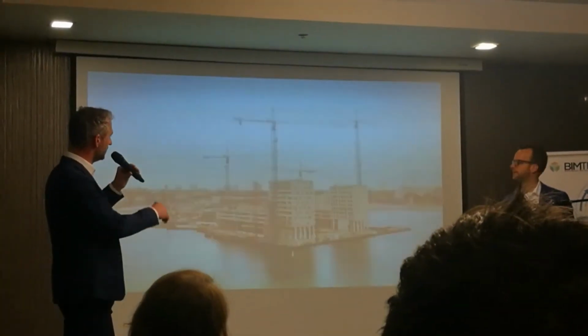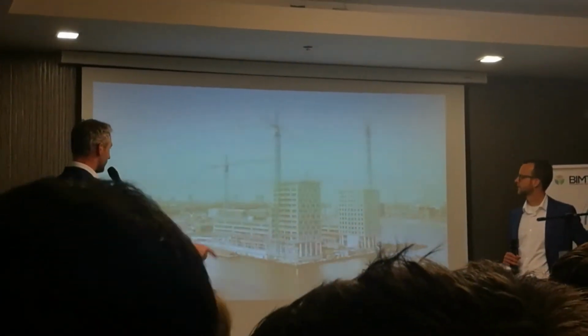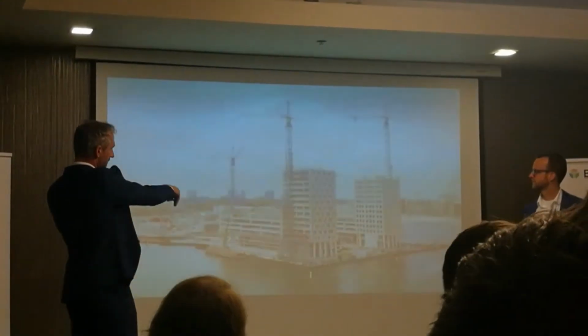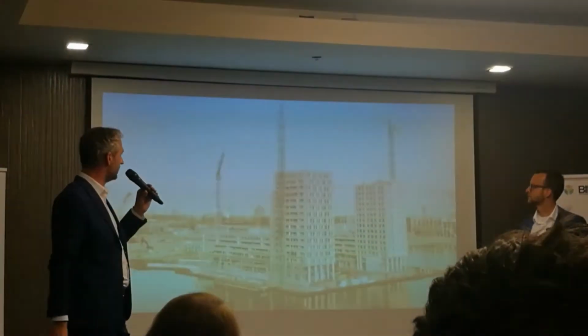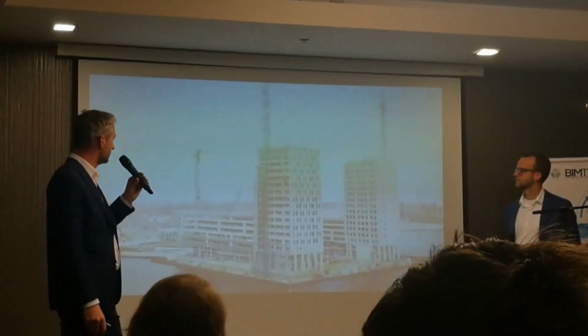And what you see is all prefabricated elements that were placed in position. So around the building there was a road for trucks, and next to the tower cranes they just had 1 movement to place a whole wall with all windows, including glass and everything.